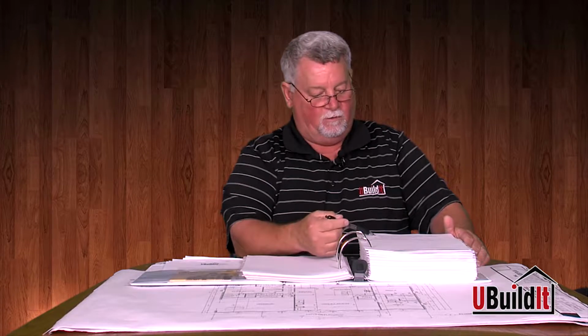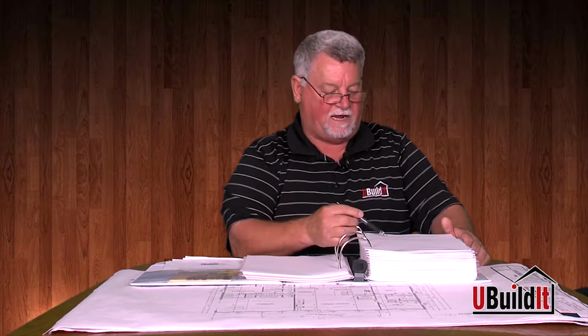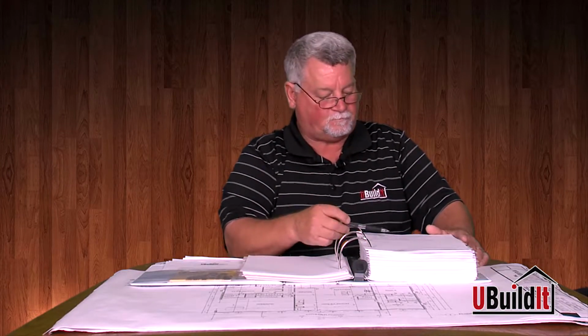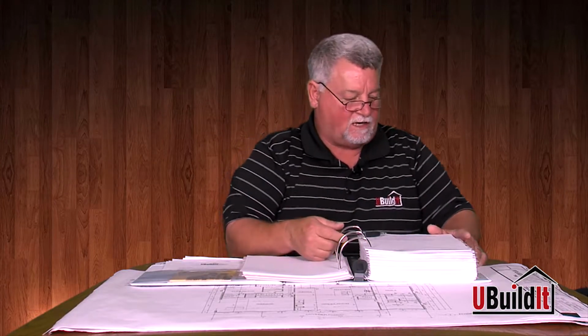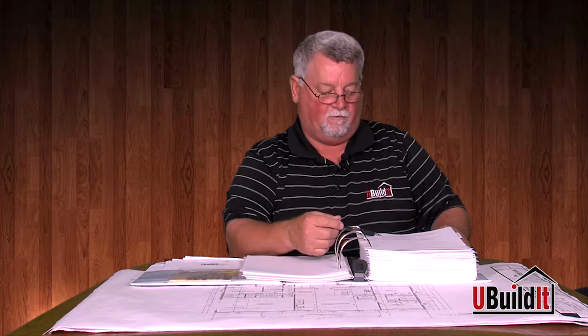After that, we're going to review stage 2. We'd like for you to come back into the office, review stage 2. We want to look back on your stage 1 budget, be sure where we are on stage 1. We want to look back at everything that happened during stage 1. Take a deep breath, kind of get ready for stage 2. Make sure that everything went well. We're not having any budget issues, and then we want to review stage 2, the stage 2 flow chart, also at that time.